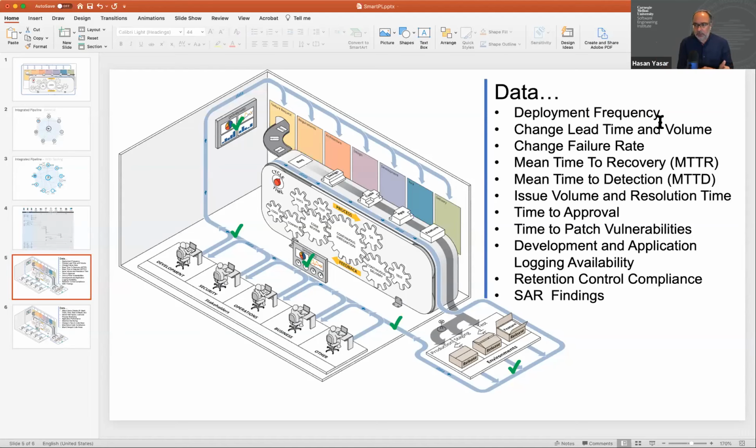So right now it's a manual process. It is manual and it's a human process. It's expertise. So basically, to be safe, and I did this many times as a developer, I always give a higher estimate because I would like to protect myself. If I put an accurate estimate and I may do something wrong, maybe something happened, I always inflate that number, maybe 10, 15% more. Project manager does the same thing. So project manager is also inflating that number.